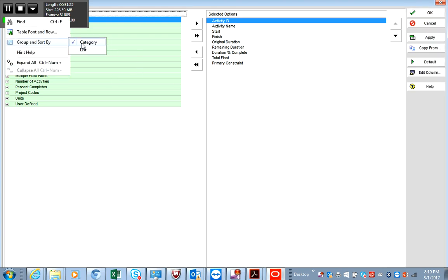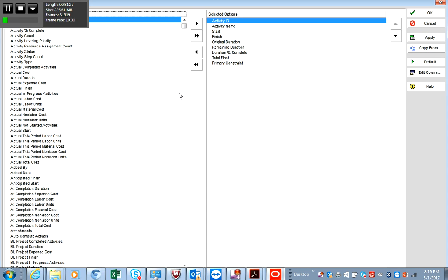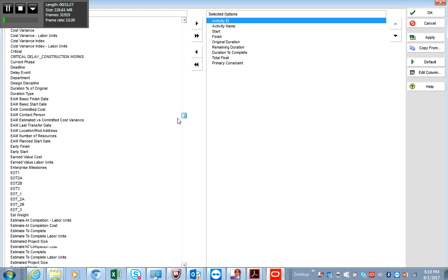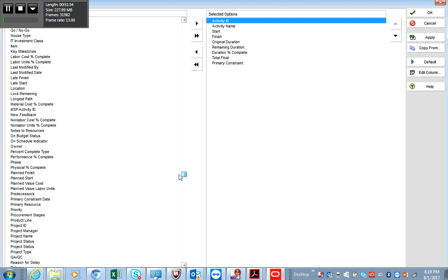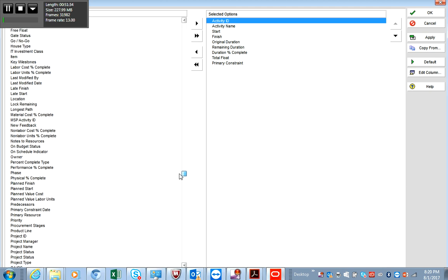Optimize the project. Okay, so what does optimization mean? Can you provide us with a definition of optimization? We either parallel some of the activities, or we double up on the resources. Okay, so can you kindly give us the definitions, give us the terminology? We want to work and get used to using terminology here. We want to accelerate it or we want to crash the critical path, right?